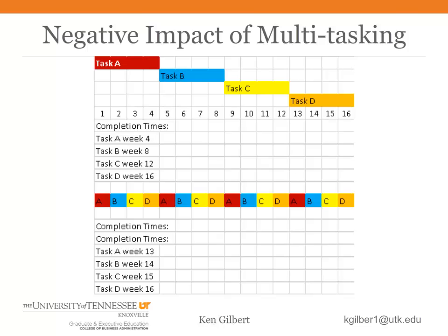Incidentally, Delta Airlines in their engine shop found that this single thing, controlling inductions, gave an immediate boost in productivity or the production rate. You waste a lot of time when you're dealing with all that extra WIP in the system. One of those wastes is multitasking. What you want to do is to put rules in place that say you cannot begin work on a task in a project until you have everything you need to complete it, and you will work on that one task